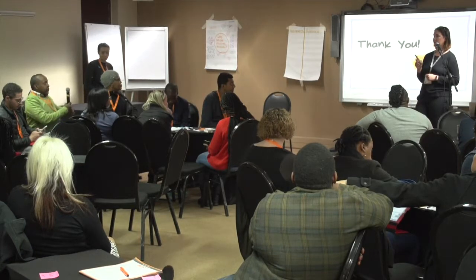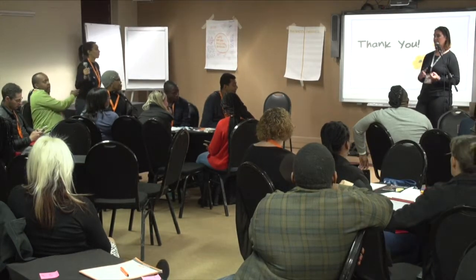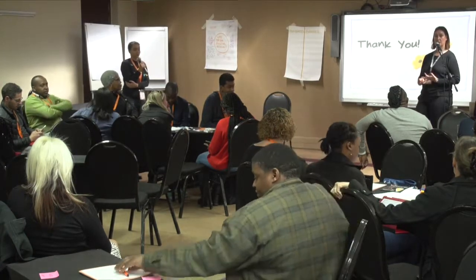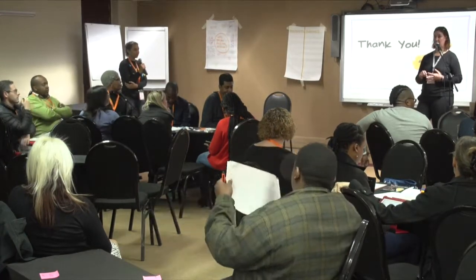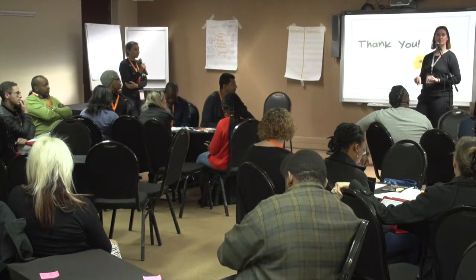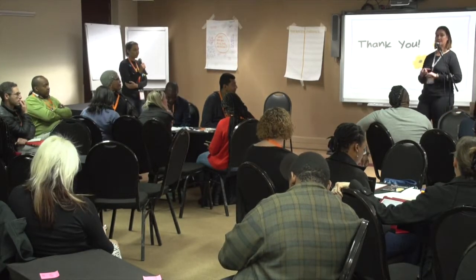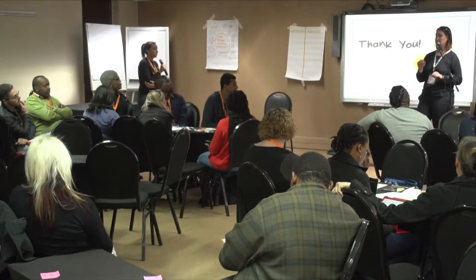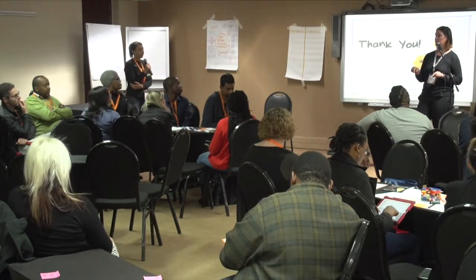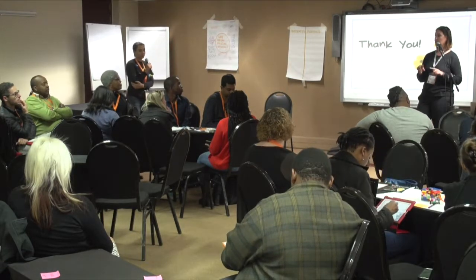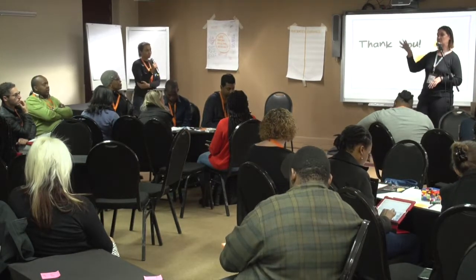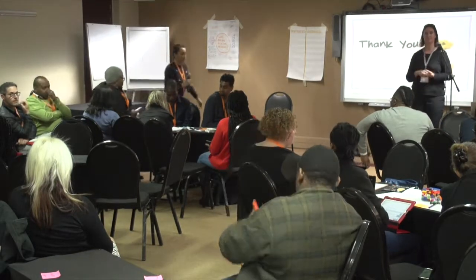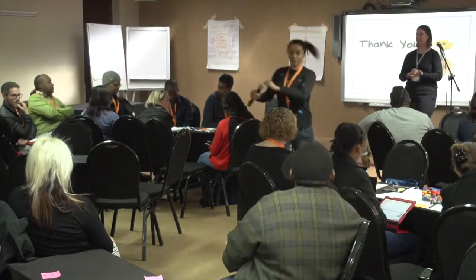Thank you for bringing that up, because we actually didn't mention that. The action that the team comes up with has to be within the control of the team. So if the team brings up they need bigger screens, excellent, great. As a Scrum Master, note that down and get cracking on that, but that is not the team's action. They need to come up with their own action, because the retro is for them to improve as a team. So it needs to be something within their control. Accountability.